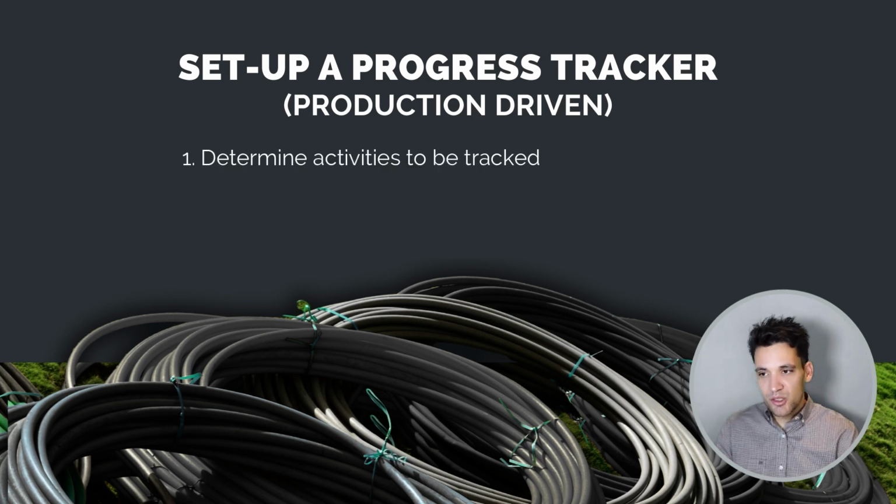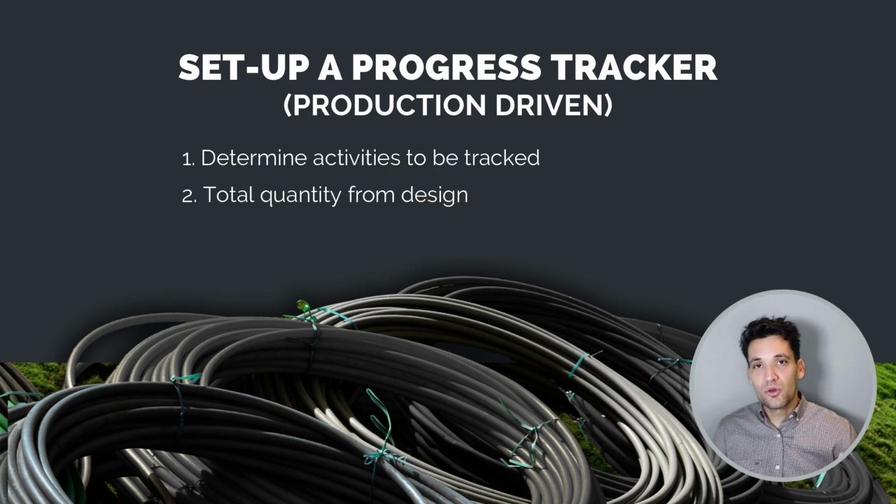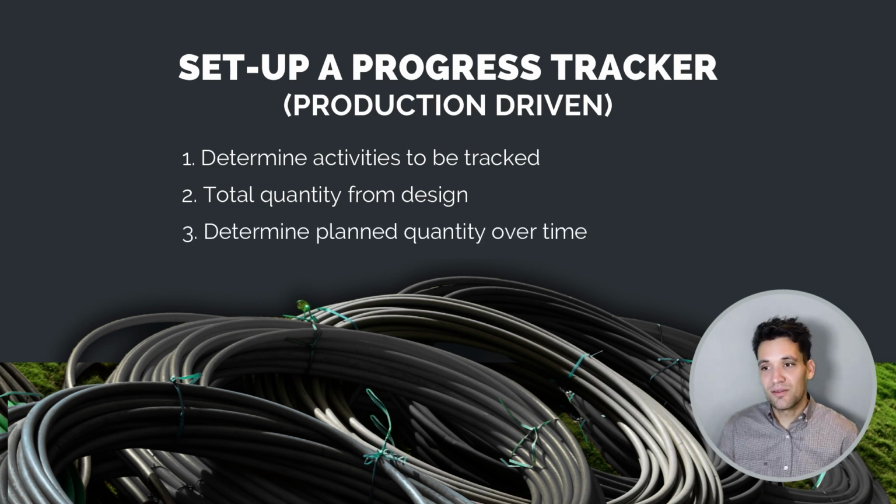Okay, so if we want to set up a progress tracker for a production-driven task, we want to determine the activity to be tracked. We want to determine the total quantity of that work from the design. So for example, we're tracking trenching. We've got 10 kilometers of trenching. Then we want to determine the start and finish date for the activity to give us a daily quantity or weekly quantity we need to be completing.